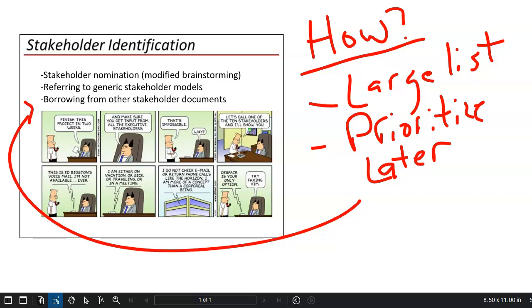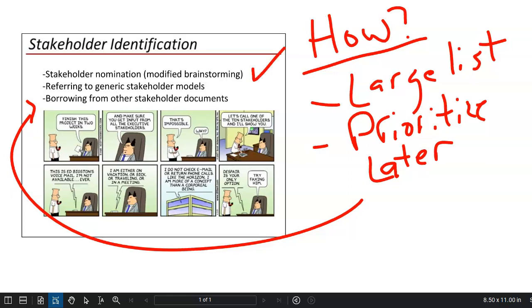It's just a modified form of brainstorming where you bring the team into the room, maybe with a facilitator and a whiteboard, and you ask the team who are all of the people, groups of people, and systems that are affected by this process. Frequently, I'll have our high-level process map and our project charter right next to us for reference, and then it just becomes a short brainstorming session where those names of individuals, groups, and systems are thrown on a board, either using post-it notes or just writing it down on a flip chart of some sort. I'm not surprised to see in a 5 or 10 minute brainstorming session 15 to 20 different stakeholder groups that